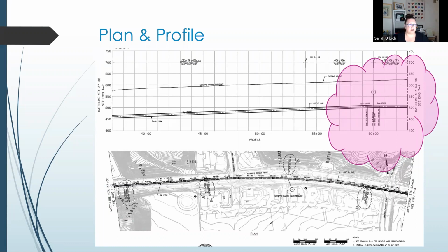So a little bit of background, and I actually snagged this from last year's presentation. So Marcine, you've seen this. This is the San Vicente pipeline down in Southern California and outside of San Diego. This was constructed over the course of about 3 years. It was 11 miles of water line for a cost of about $205 million. The catch here was that instead of opening up the trenches, what they decided to do was use a tunnel boring machine.